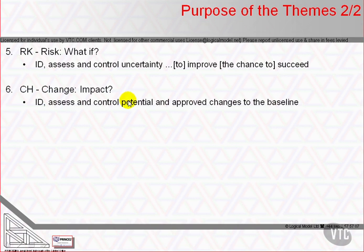Sixth is the change theme. The change theme describes how PRINCE2 assesses and acts on issues which may impact on any aspects of the project's baseline of agreed plans and completed products. In PRINCE2, issues may be any of unanticipated general problems, requests for change, instances of quality failure, or questions raised by anyone at any time. It answers the question: what's the impact? And sometimes the answer is not much. In those circumstances, we'd like the cost of the change activities to be low through use of informal methods.